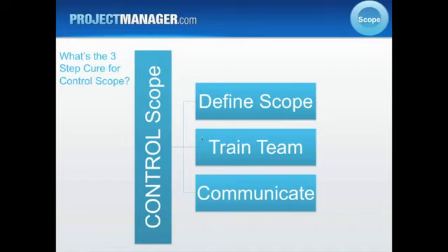However, when it's submitted to the change control board and goes through the evaluation process, it could be approved to include in this release of the project, and then they do the due diligence to figure out what's going. Maybe this is included and something else is removed, or it could be valid and go into the next phase or the next release. So typically what the customer is trying to add is valid. It just needs to go to the correct process.